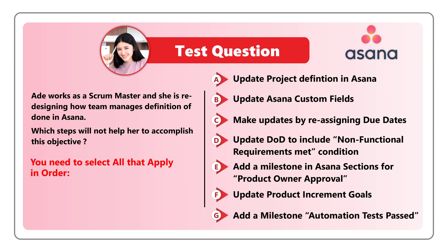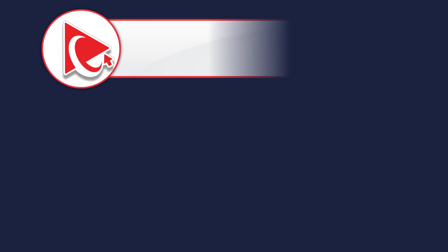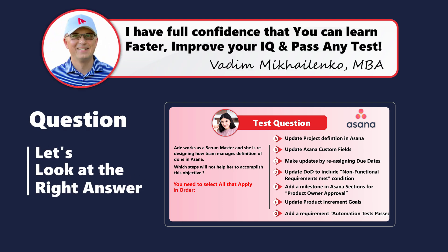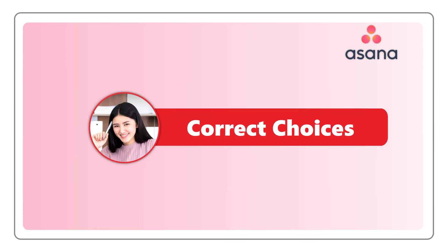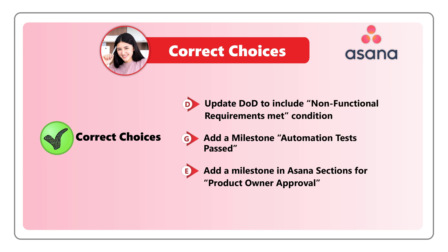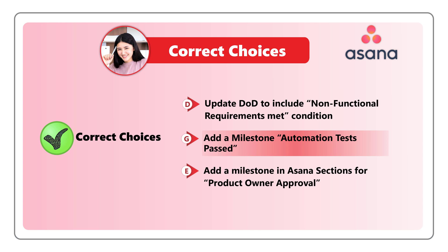Take a close look — maybe pause to see if you can select all the right answers. Based on my experience, I think the correct choices are D, G, and E. Choice D: Update DoD — definition of done — to include non-functional requirements met condition. Choice G: Add a milestone — automation tests passed. And Choice E: Add a milestone in Asana sections for product owner approval.